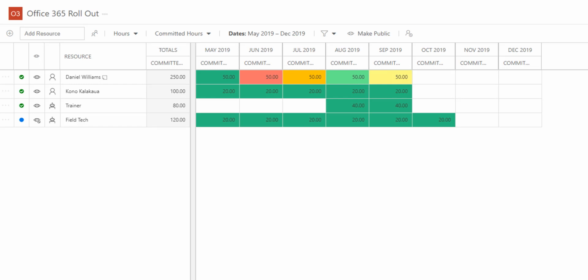The reason these groupings are called cost types is because the resource plan hours may be converted to costs when they are imported into the financial plan. The rate for each resource, according to their role or other cost category factor, would be multiplied by the number of hours to get the financial value of that resource's time. Your organization may have similar or different cost types depending on business use case and configuration.